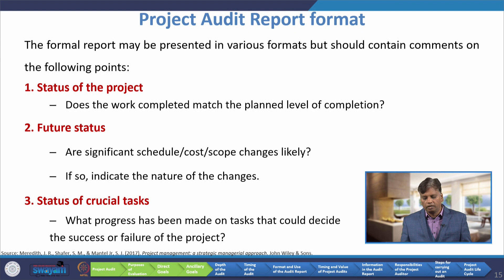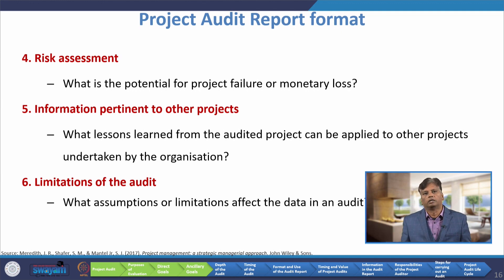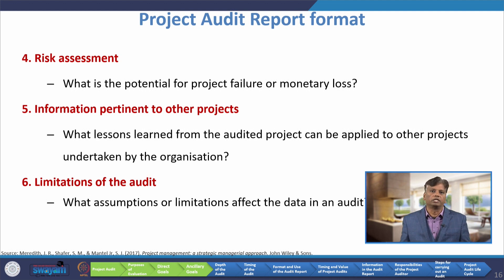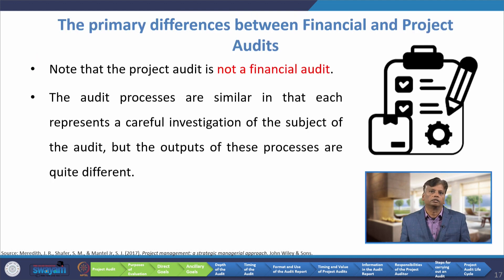What progress has been made on tasks that could decide the success or failure of the project? The fourth item in the audit report is risk assessment — what is the potential for the project's failure or monetary loss? The next comment expected is information pertinent to other projects: what lessons learned from the audited project can be applied to other projects undertaken by the organization? Then the limitations of the audit: what assumptions or limitations affect the data in the audit?